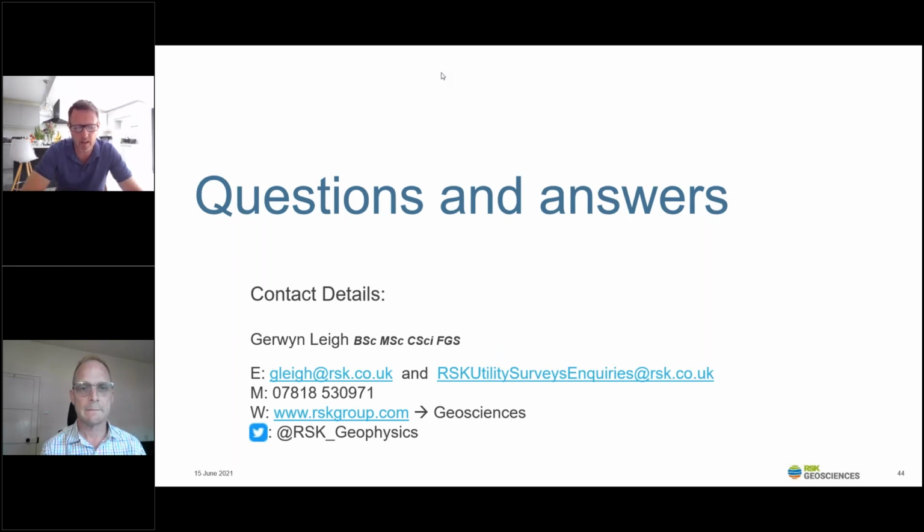Well, typically, statutory undertakers update their drawings quarterly, so 3 months, 90 days. After that, it's considered out of date. So really, we should get an updated set of service plans. Now, if a client has PC control of that land and knows full well that nothing else has gone in, we can use the most recent set of drawings as long as the client has confirmed to us that no other works have taken place. But as a general rule, 3 months, 90 days, the plans are in date.